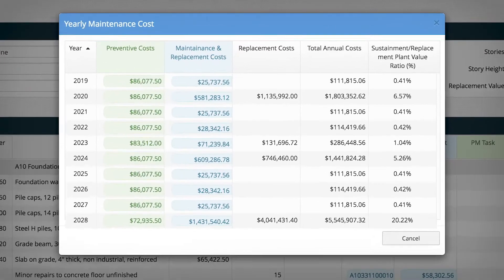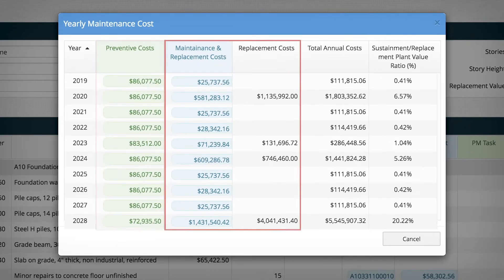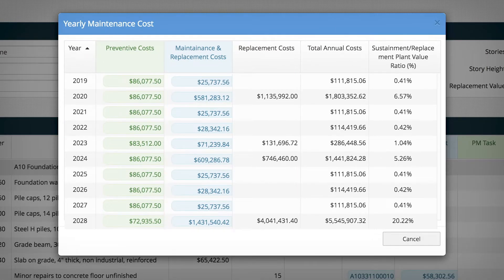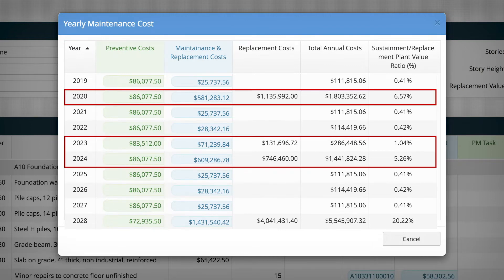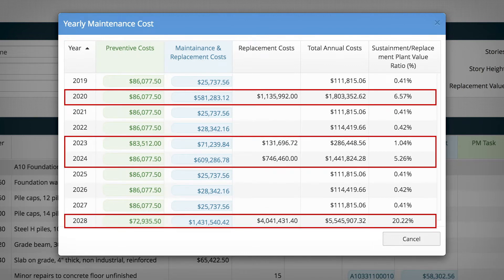Here you have yearly preventive costs and maintenance and replacement costs for our entire ten-year time period. This is perfect for budgeting. You can see that a few years out, costs are going to spike, and you can start planning right now.